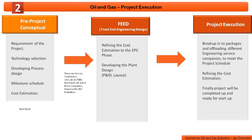After getting the project, the service contractors break it into packages. One company cannot do all the engineering services - it would take too much time and they cannot afford the manpower. Once a company completes the FEED engineering, they break the project into packages and offload them to different engineering companies to meet project targets.